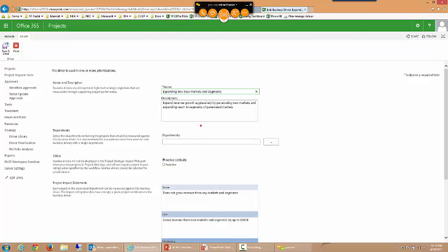One thing you can do is isolate drivers to specific departments. That's particularly useful. An example would be if you have some drivers that are measuring a very HR-specific goal like employee retention, you might not necessarily want to use that driver in every analysis. You might want to use that driver specifically in the analysis that you perform against HR-related projects. If you're building a new piece of software or you have a marketing campaign coming up, that might not have a whole lot of impact on, say, employee satisfaction. So using the department filter is a way you can align your drivers to specific projects and also to specific analyses.